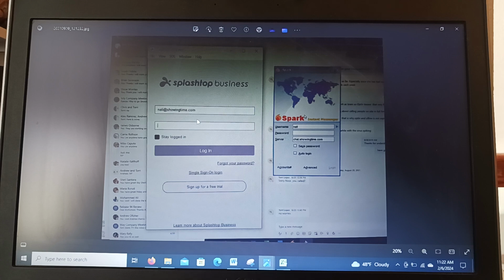Now, keep that in mind, if the risk is accepted at the pre-go-live by your manager, by the director, by the task holders, and the other people involved, then you can go through the project and complete the project. Risk has to be accepted, okay? They know that the 50 end users, their old PCs are out of life, OS is out of life, and they're getting an upgrade with a new PC or a laptop, which will have all new stuff in it. Now, those 50 people or end users that you have on your spreadsheet, if they get their new PC before the project is over, it's going to become your responsibility to make sure the agents are installed, make sure you take them out of your list.